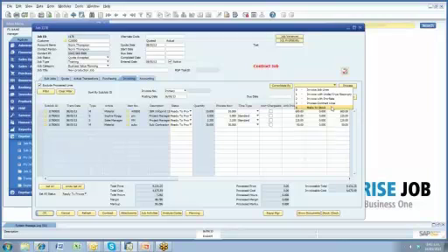So one purchase order is for the supplier who does the printing, perhaps another one does the artwork, another one binds the books together, and then maybe another one packages it all up. So once all that work is done and they've received those 4 invoices and created them as AP invoices, then they just come into here and say make to stock, and they say put 1,000 books into stock. So the books go into stock at the actual cost to them, and then they use the standard Business One sales process from there to sell them.